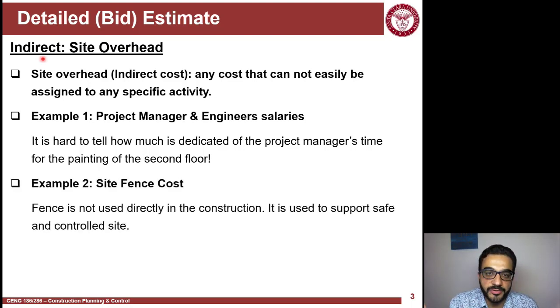Another example is the fence. You have to secure your site, so you install a temporary fence around it. Same thing, it's there all the time, serving the whole project. All the activities are dependent on having a fence around it for safety reasons.